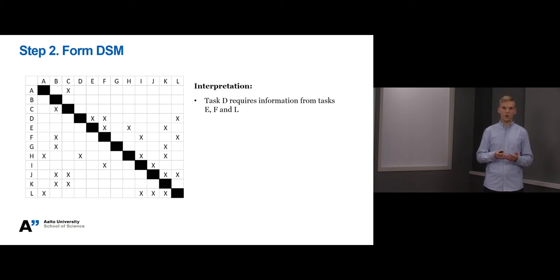For instance, row D means that task D requires information from tasks E, F and L. In turn, column B means that task B produces information to tasks C, F, J, G and K.